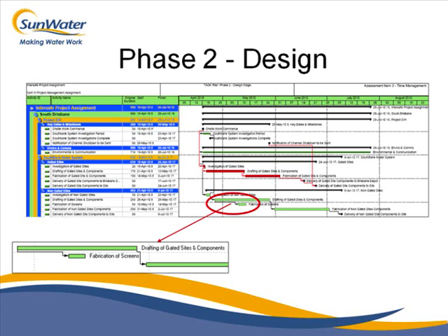Partway through, obviously, the screen sites, the sites that actually require a screen, that stuff can go off to be fabricated. It's being done by an independent person. Whereas the next activity along, that's the remaining of the gated sites. So all this sort of stuff can be done here. So we put in a lead of about 2 weeks, I think it is in this instance. Yeah. So 2 weeks after the drafting's commenced, we assume that they would have finished those sites, or that drafting, so then they go off to the fabricators and they can fabricate the screens for us.